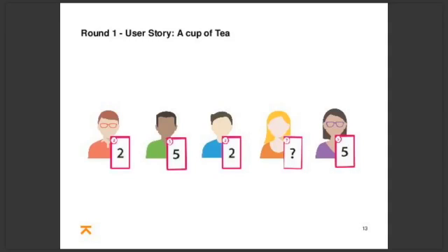So the facilitator noted the issue with the water as being a risk. A dependency was duly noted that a kettle from a tier 1 kettle manufacturer needed to be used that ensured it would boil in less than 2 minutes at the right temperature. And it was decided loose leaf tea was out of scope because it was creating an increased overhead in complexity.